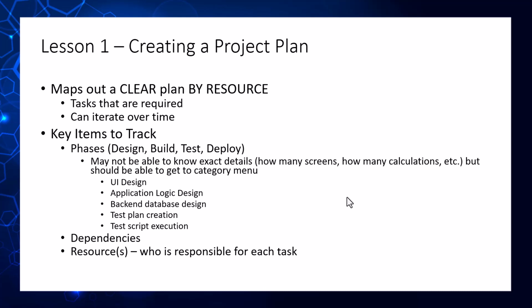And in others, you may say, well, we're waiting for access to a server, let's just say, so we can't do task A. So in the meantime, we're going to do task B. So maybe you didn't slip in terms of the timeline because there are other tasks you were able to jump to. So you want to make sure that you're tracking that, and the more of these that you do, you'll start to get a better feel for what are the key things that tend to slip, and what are the key things that maybe go faster than what you envision.